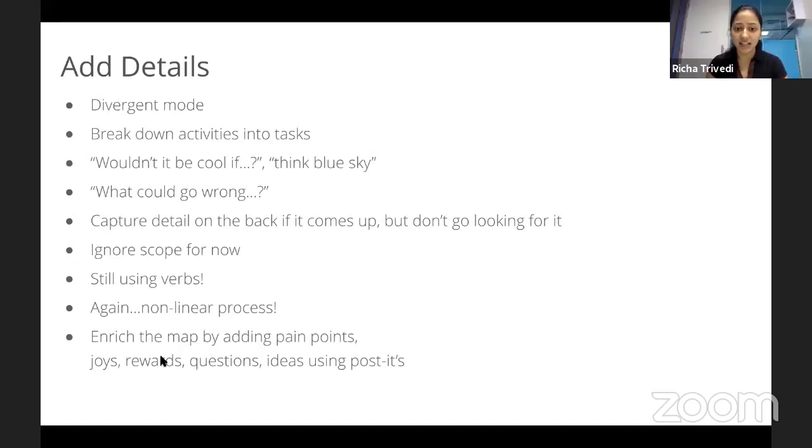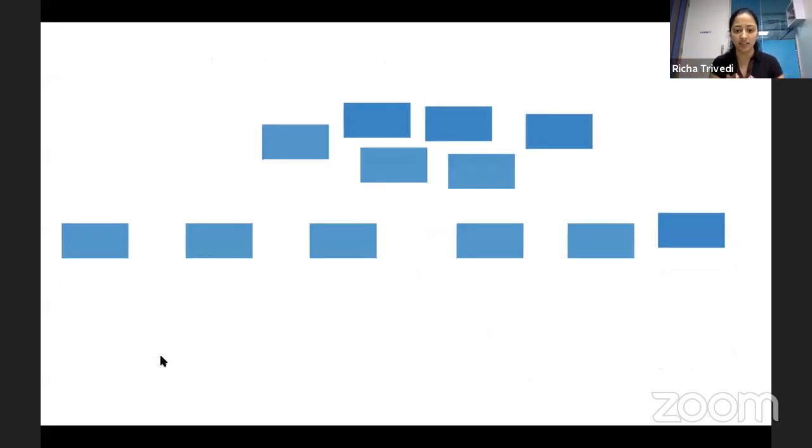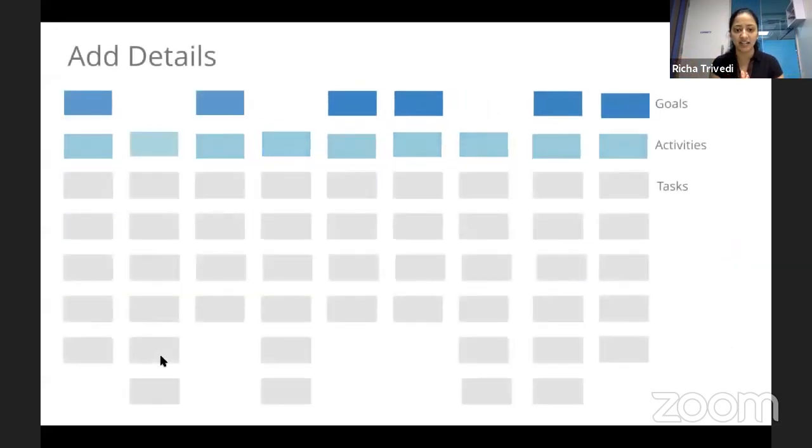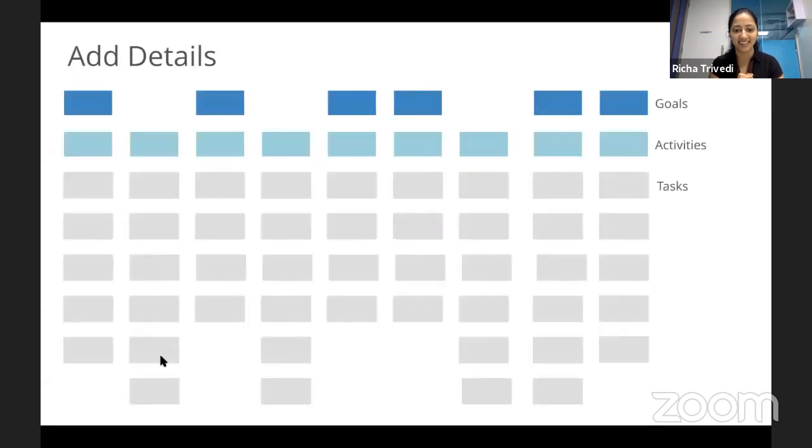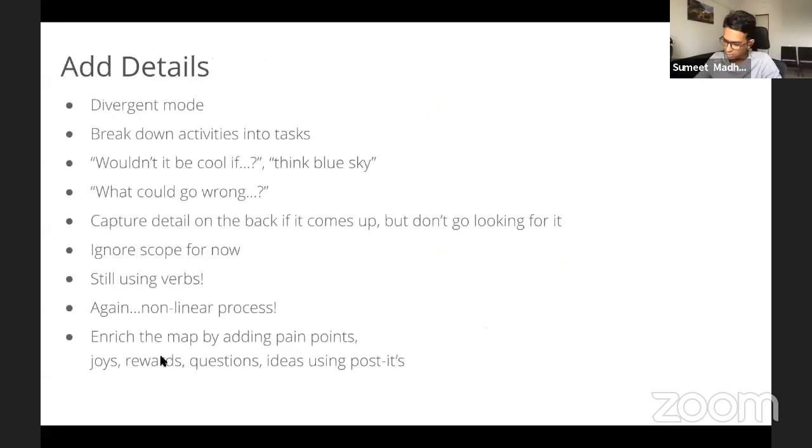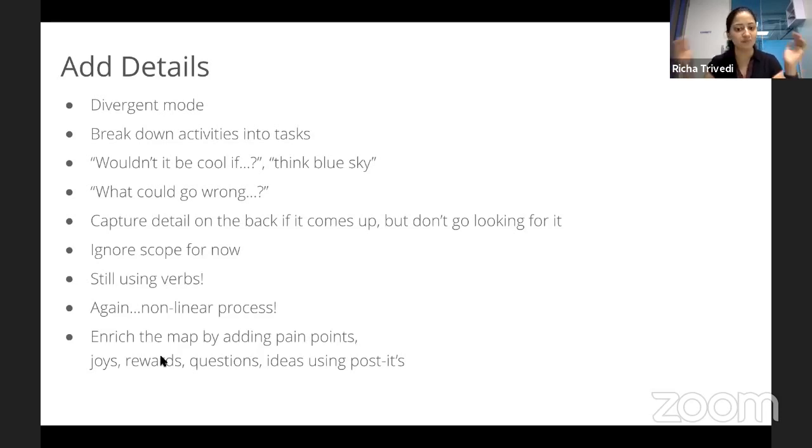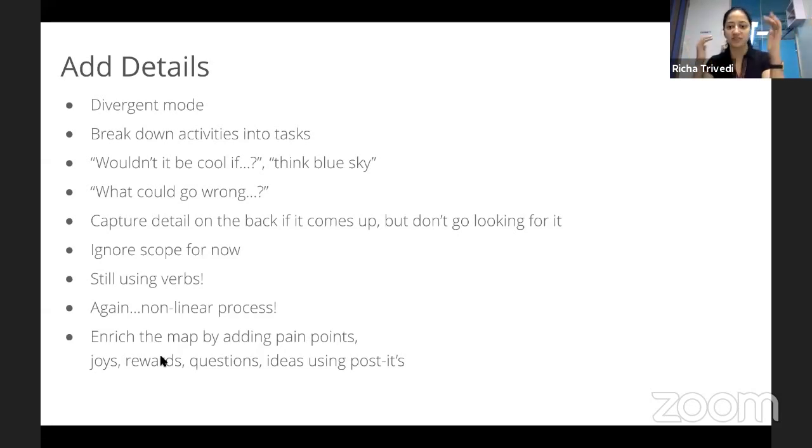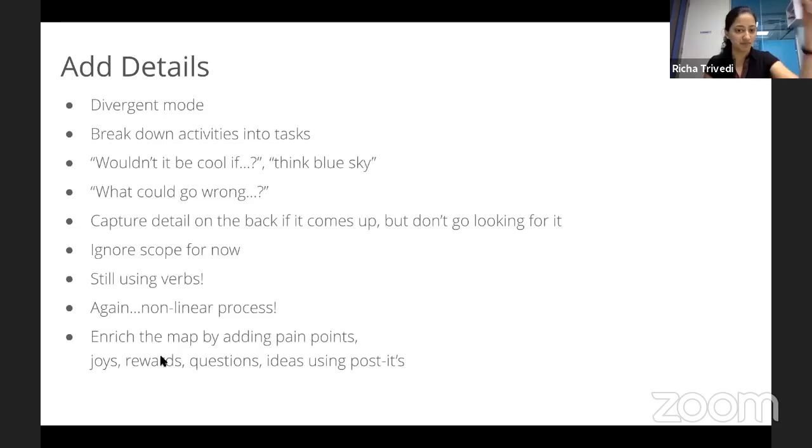After that, if you're already on an existing project, you might have certain stories. Just align all the stories. So if you're on an existing project, you might already have a lot of stories in place. Just place them under the feature. If you align the features, just place them underneath it. If you're on a new project, you have the detail user journey steps, put them under the major user journey steps. If there is anything more that you need to add, these are the questions, ask yourself. These will help you in adding more details.